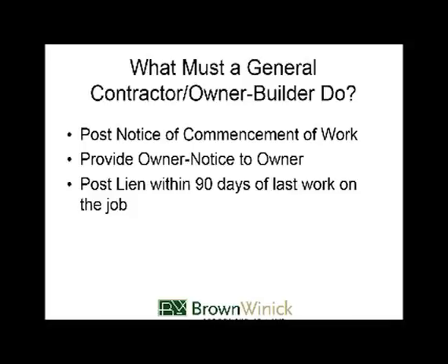So you just take a look at the notices you get, pay attention to who's working on your property, and try to get some lien waivers put in place before you make payment. That's the best way to protect yourself from lien claims, is to have lien waivers signed and given to you before you give out any payments. And get those so that people are waiving their lien rights up to the date of your payment, as well as waiving for the work done that constitutes that payment. That belt and suspenders approach works really well because it prevents lien claimants from coming back later and trying to ask for more money if you use the belt and suspenders approach.